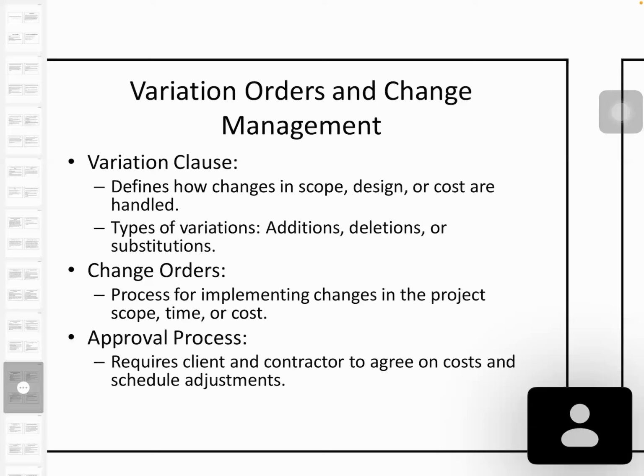And the project has to go for piles. In that case, the contractor said, I am not capable of doing that. So at that time you have to exit from the contract. You can't do it. Or sometimes you have to agree and give it to a third party to do that.